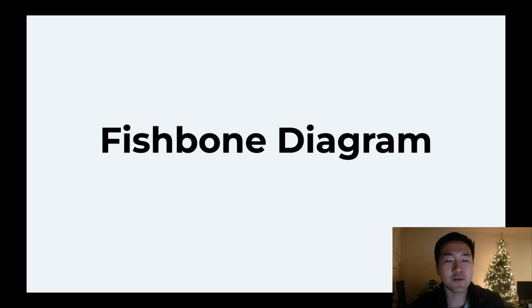Fishbone diagram. So fishbone diagram, I like to associate this one with another buzzword called RCA, root cause analysis. Really what you're doing here is when there's an issue or a problem, it's drilling down every little crevice, every potential tree to see what potentially could have caused this. Fishbone diagram is one example of how you do root cause analysis. It's where you take a problem and then you break it down into what all the subproblems are, and then drilling down to the most small level possible to really understand where could the problem have arisen.